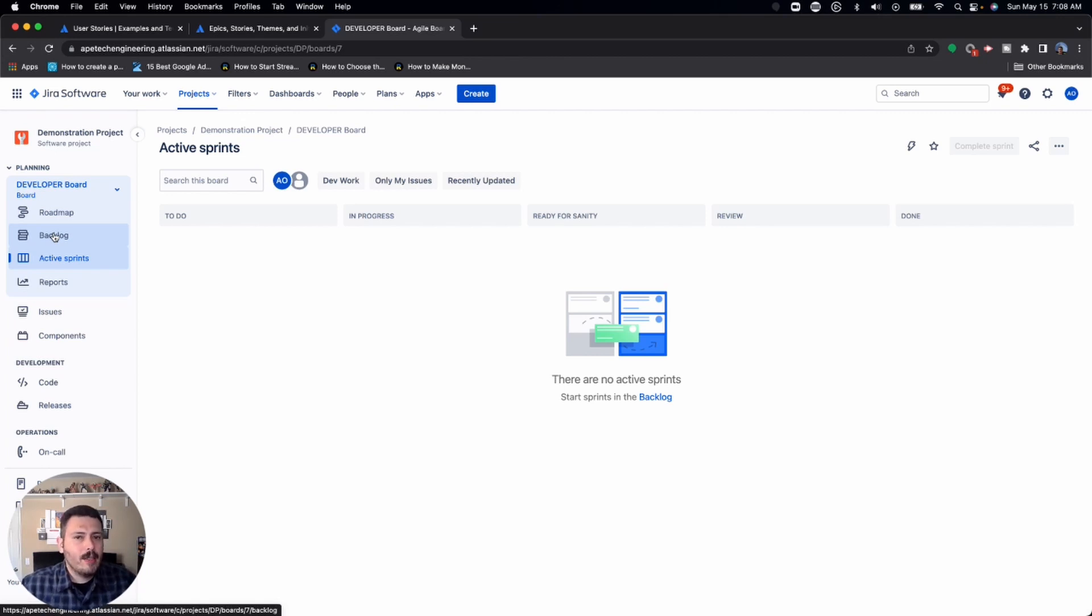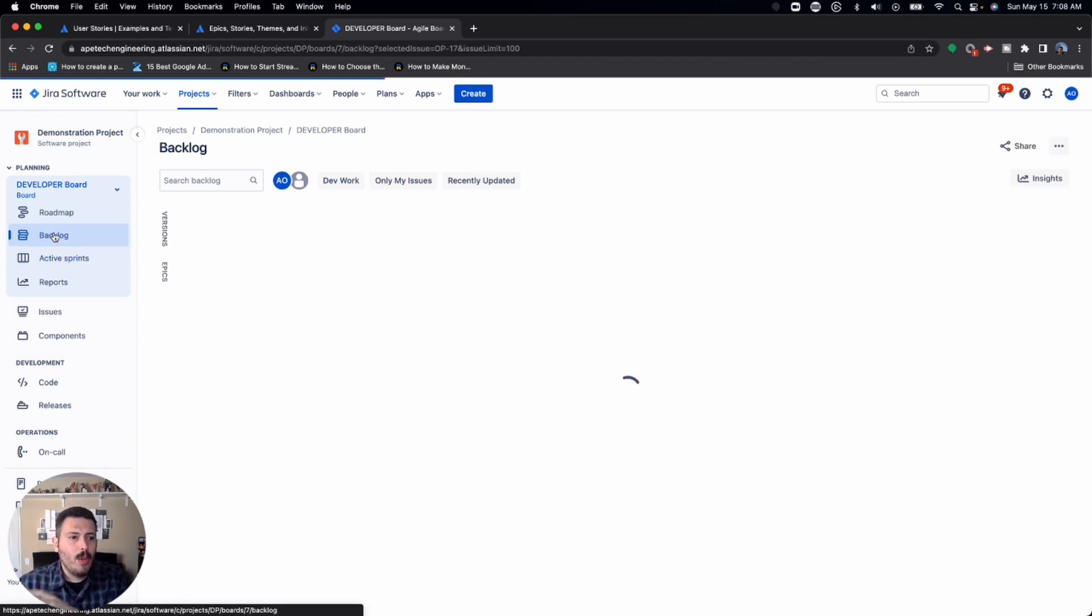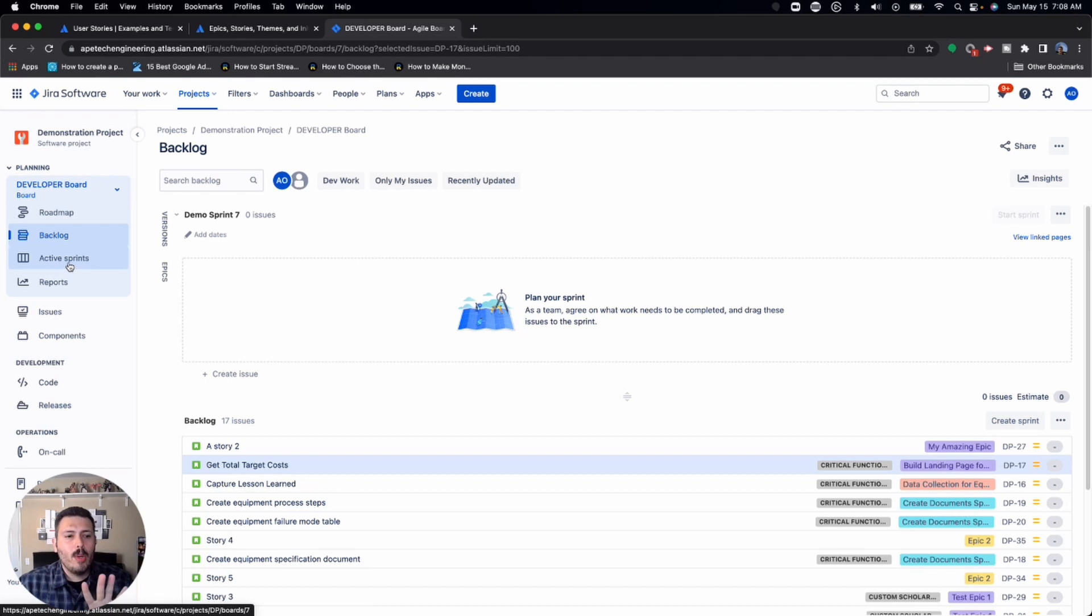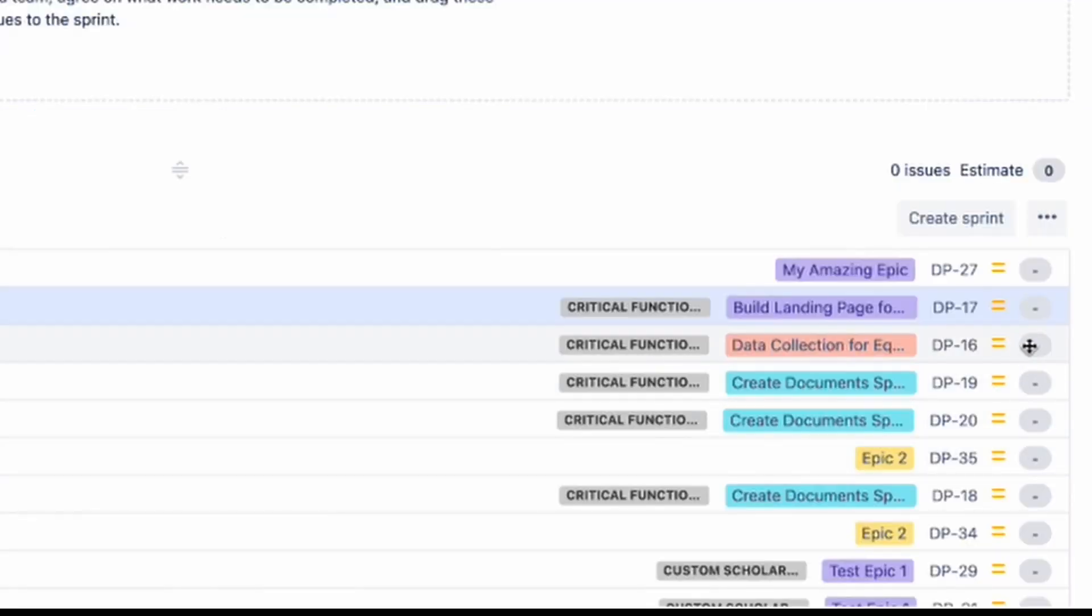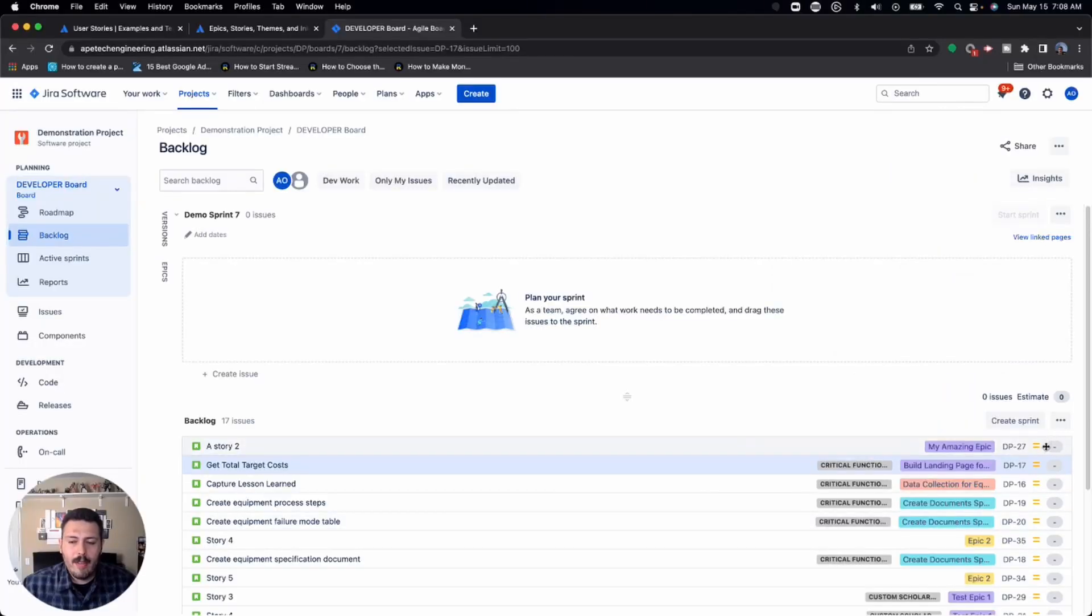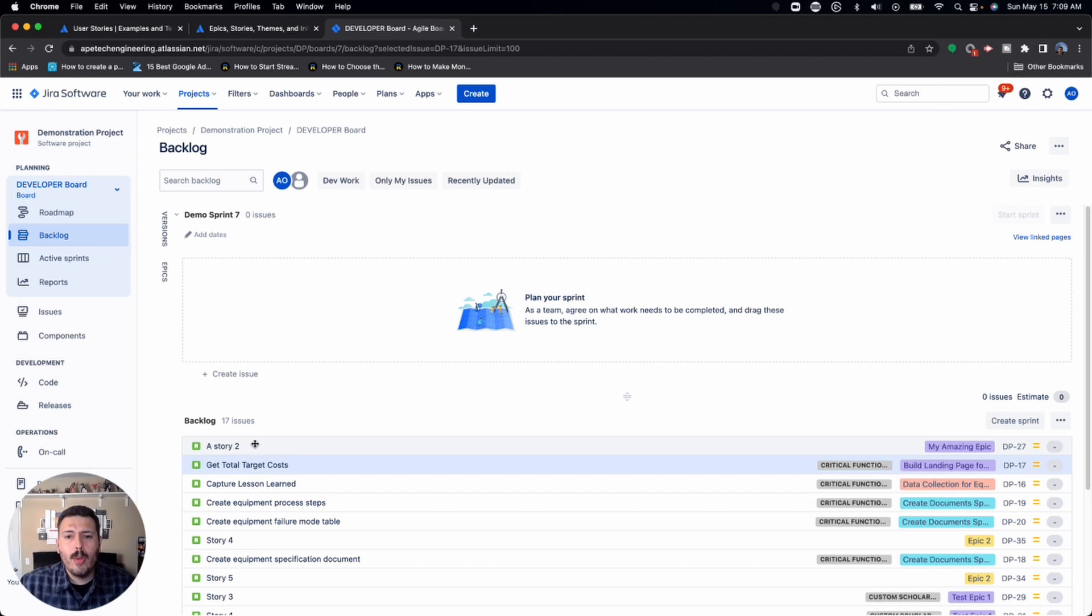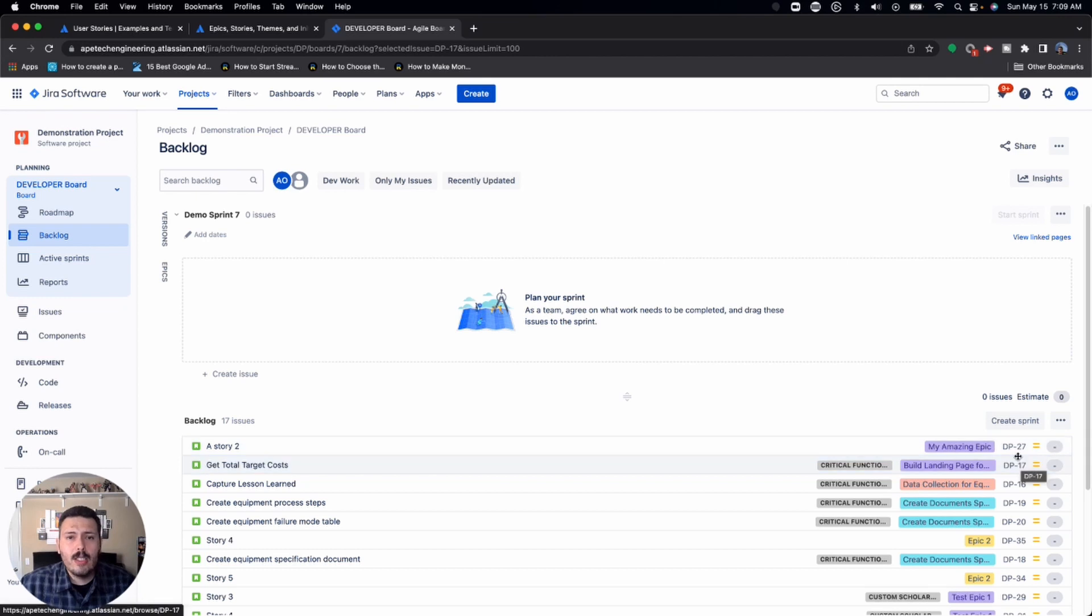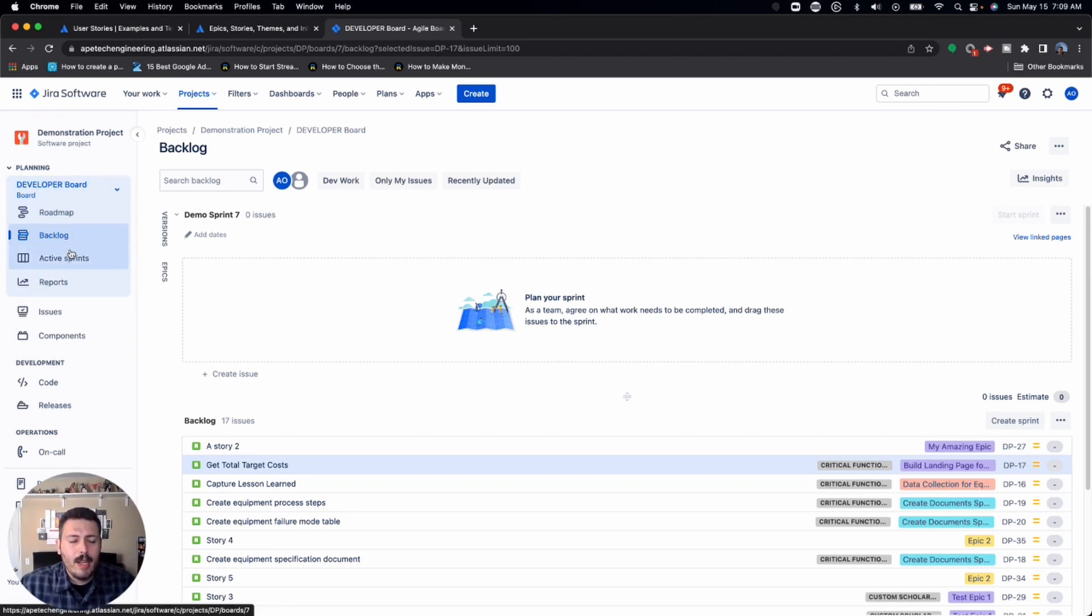Now, please keep in mind that story points go hand in hand with a scrum board type. When you have a scrum board type, you'll notice that your issues over here on the right have this little gray bubble with a dash in them. That means that each of these issues, these stories in this case, do not have any story points associated to them. If you don't see this little bubble here on the right, that means your board doesn't support story points. So you're going to want to make sure you're in a scrum type board.